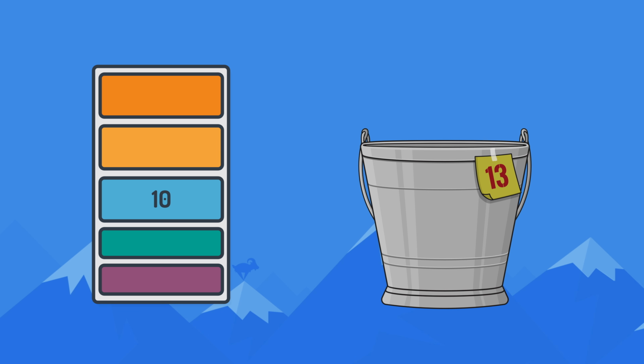You might be concerned that this rounding up of estimates could lead to inflated or padded schedules. Let me explain why that usually won't happen. Consider a product backlog item that you believe should be 10 points, but you're using the modified Fibonacci sequence and are following this rounding up strategy I recommend. And so the bucket you throw the product backlog item into will be 13. Next, let's assume that at 13 points, the item is too big to bring into a sprint. And so the team splits it into smaller stories.